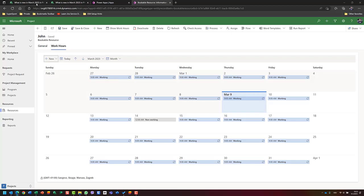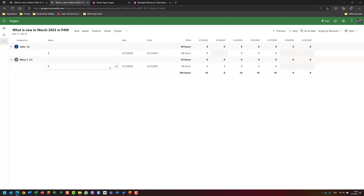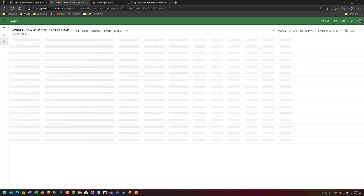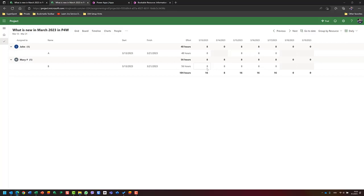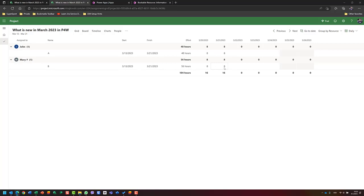Because this is a fixed duration task, in the assignment view John works Monday, skips Tuesday the 14th, then Wednesday, Thursday, Friday, and next Monday and Tuesday — six actual working days times 8 hours equals 48 hours. Mary has no day off, so she works Monday to Friday the first week and Monday to Tuesday the second week, resulting in 56 hours.